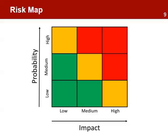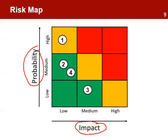Once all the risks have been identified and their levels of probability and impact qualified, the project manager can use that information to create a simple risk map that will help visualize all the risks in the project. The risk map is a 3x3 grid. On the horizontal axis are the values for impact, and on the vertical axis are the values for probability. In this example, one can see that most of the risks are in the low risk area, but there are two risks in the high area that will require special attention.